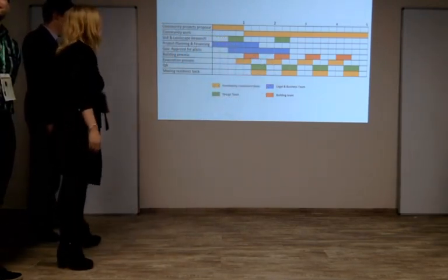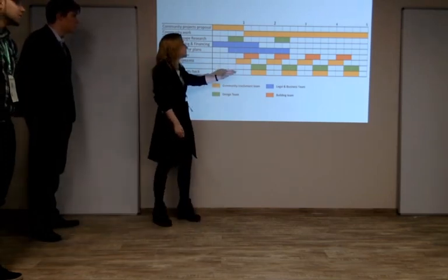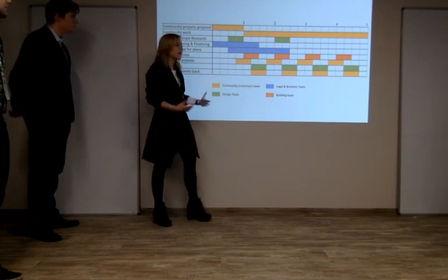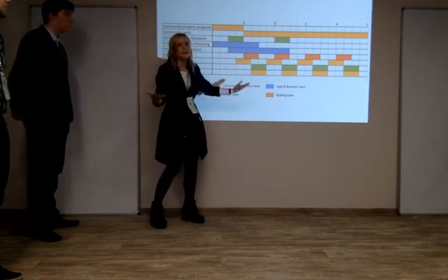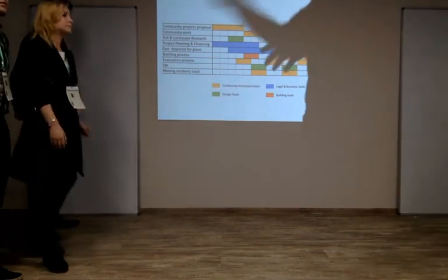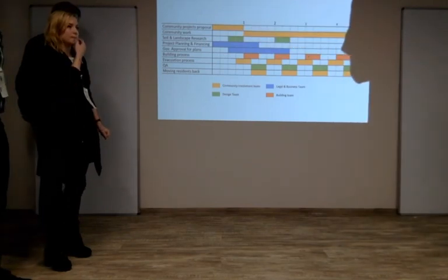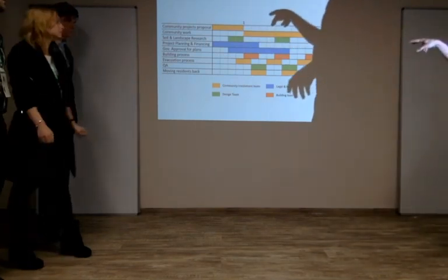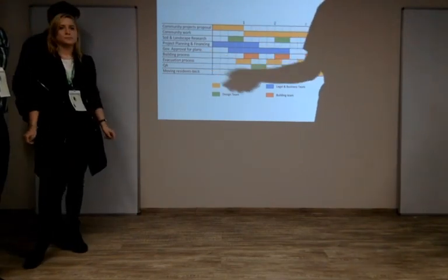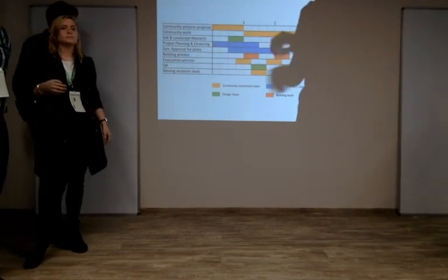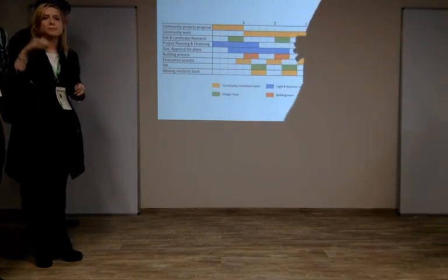But the building is made at the same time as the evacuation. We're not moving everybody at the same time. So this is just an estimation. This is one block, this is another block. It's not like we're tearing one building down and taking the people out only of that building. Those stages were composed of multiple building reconstructions. So we have 3 to 4 buildings. We cannot get everyone out, we get them out in steps. That's why they're doing that. Okay, thank you.